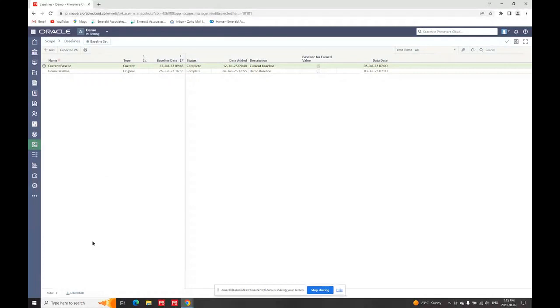So you've got another piece there for scope, which is a little different take on how you would actually set up your schedule, because you don't have to work from having the schedule built and then create spreadsheets or anything like that to track these elements. You can start with the scope items before you have your schedule, of course, then go through your work packages, your scope assignments, and you're working from the pieces you need to cover off the work to get to where the activities in your schedule are going to be.